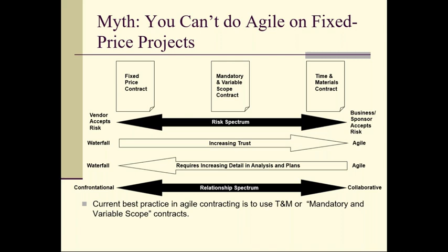But the real answer was I think I could get it done in 5 months, not 6, because I think my team's productivity, called velocity in Agile, is going to be about 60 points per iteration. So I can complete that 300 points in 1 less month. But to be more conservative, I wanted to add on that extra month of buffer on the schedule.